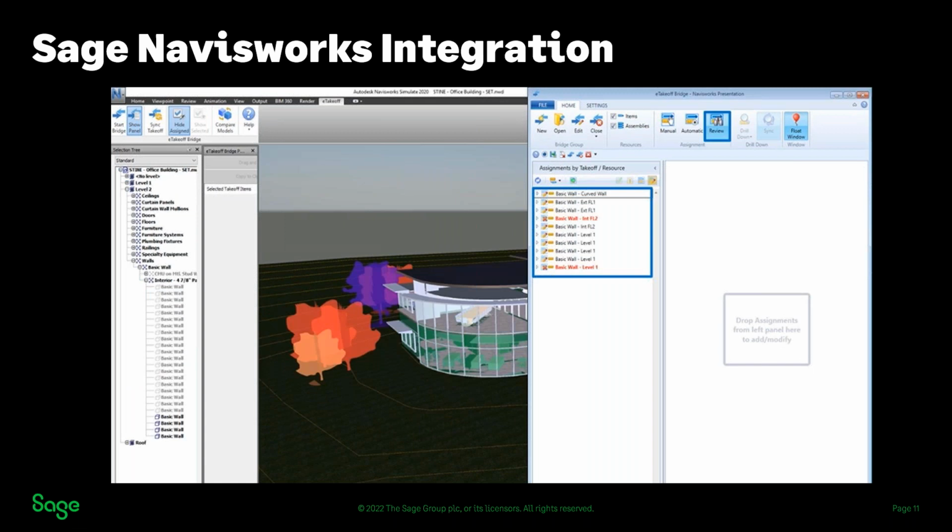Awesome. Now, in comes that new rendering. It has more details, more objects, and maybe changes to that rendering have happened. Well, if you get that, you want to overlay it over the top of that last one that I showed you. Now the system is going to give you the opportunity to see the changes. So you can see all those pencil marks right there. And you may have to lean into the screen a little bit to see those, but maybe walls have been taken out. And if I could click on that, I would typically show, hey, these are the differences. This is why this wall changed over here, so to speak. But I can't do that right now.